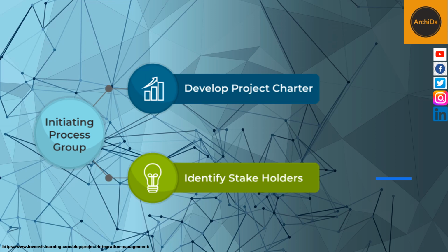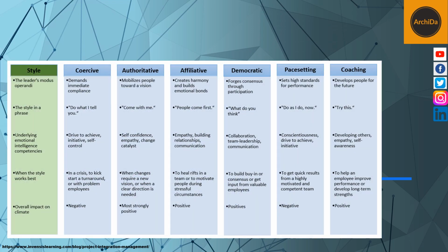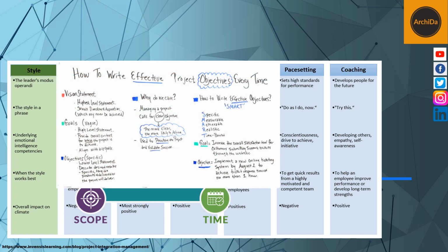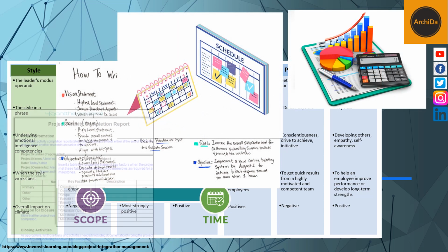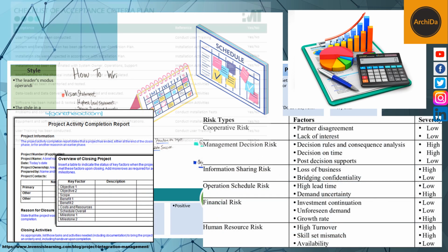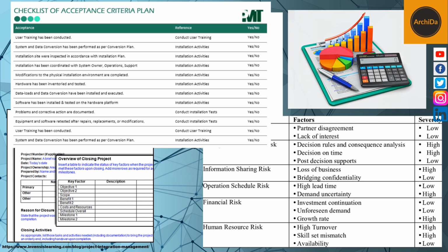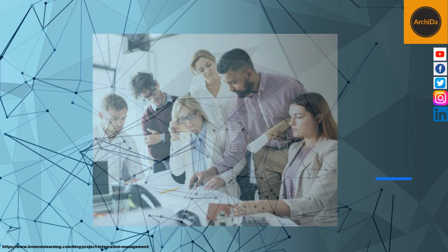Now, the inputs to initiating a project group: first of all, you need the business need, then objectives of the project, followed by product scope and project scope, then budget information, after which schedule information. After that is information on the completion of the project, followed by associated risk information, then project acceptance criteria, also the name of the signatory authority and project manager, then the authoritative power of the project manager, and last is the pre-assigned team members.